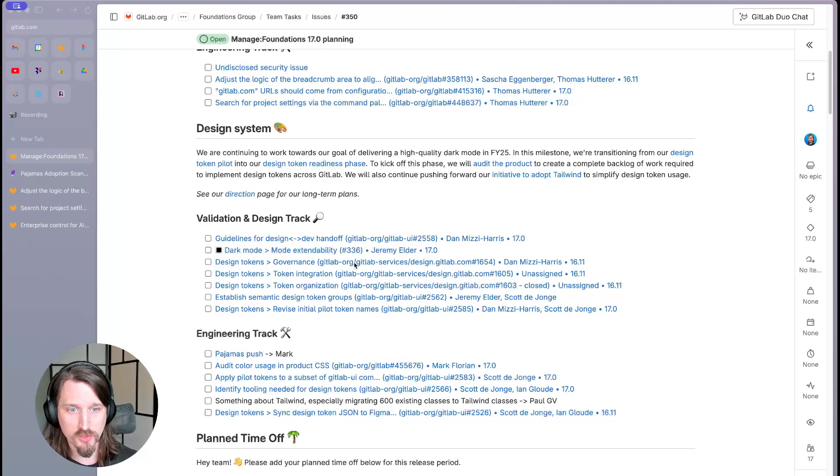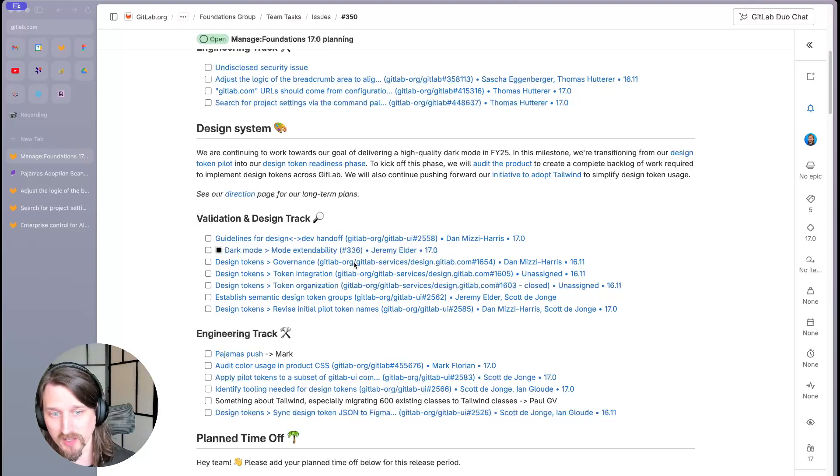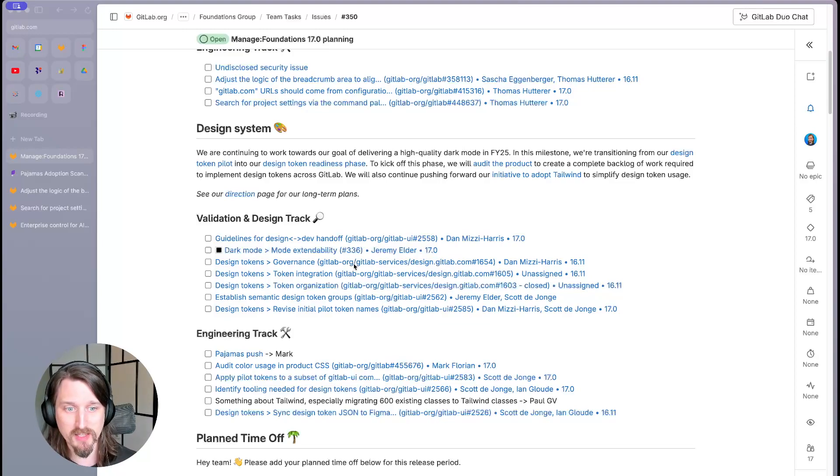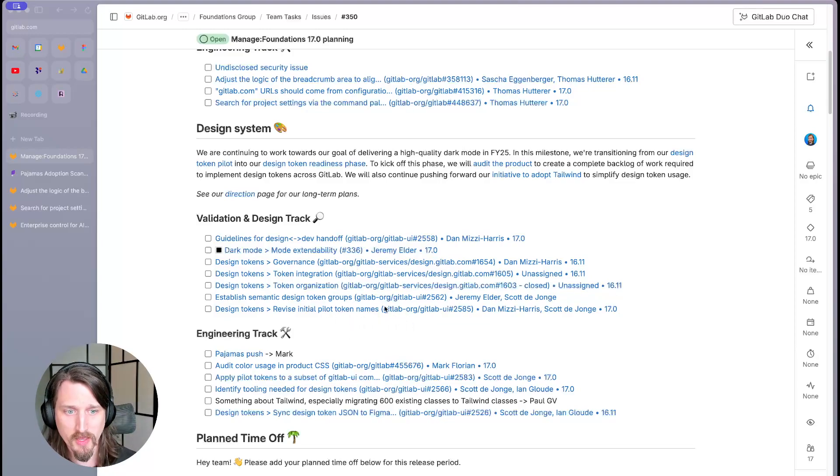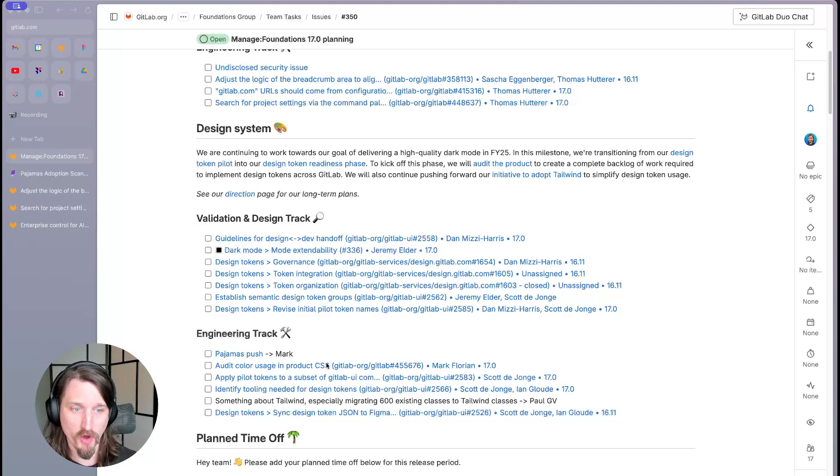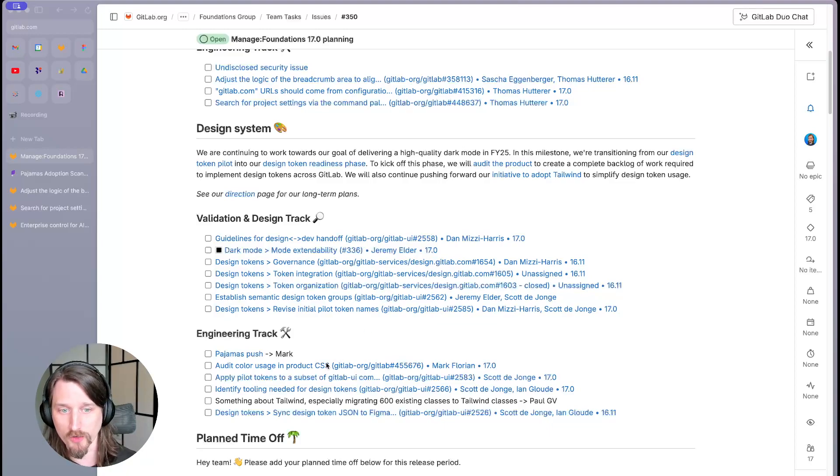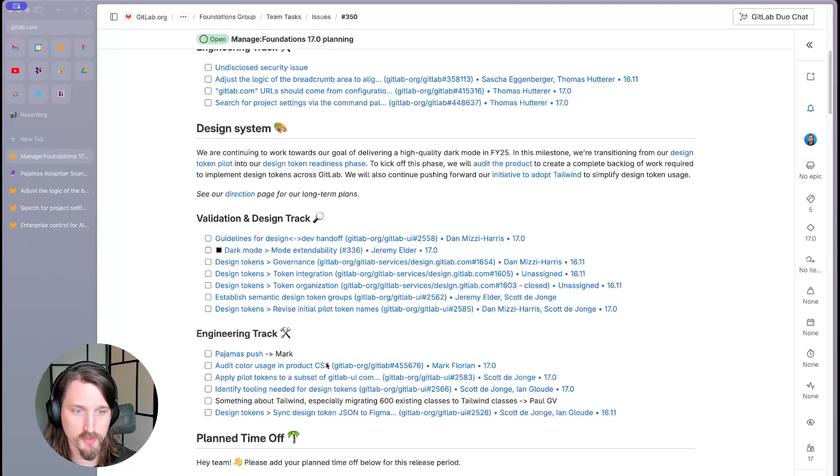As a last task for our pilot, we are going to apply our pilot tokens to a collection of GitLab UI components, making them officially the first production design tokens. To kick off the next phase, we will audit the product to create a complete backlog of work required to implement design tokens across GitLab.